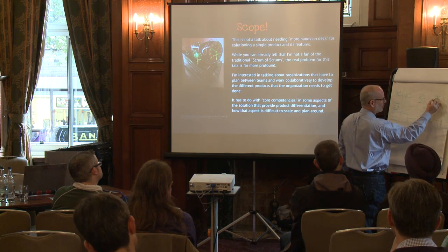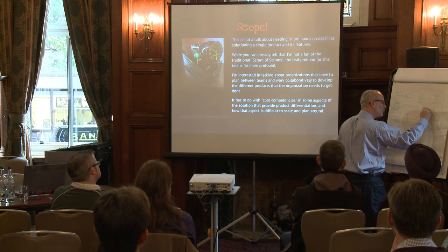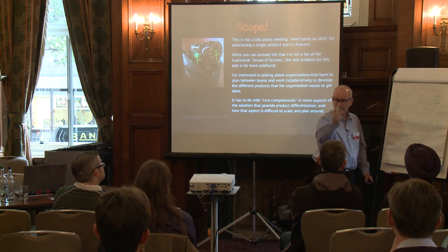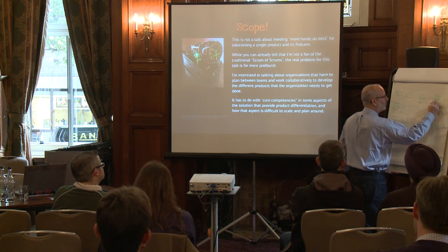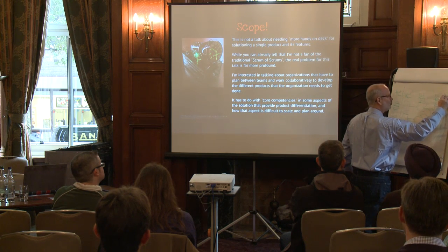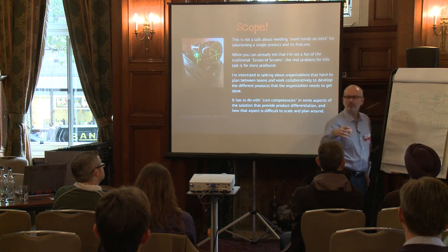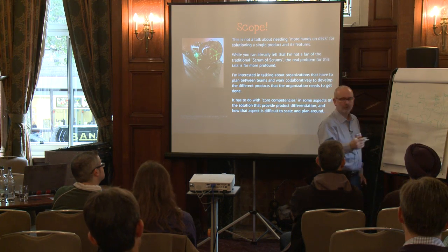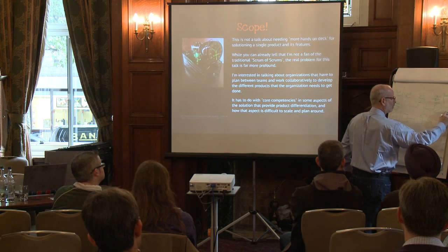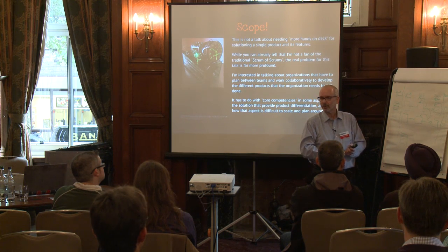Instead of a demo for each group, all of these will come together into a demo for the group of groups. They'll split up. Each team will do their retrospective: how do we get better as a team in our sprints to go? And then there'll be a retrospective for the team of teams. How do we work better as an organization?